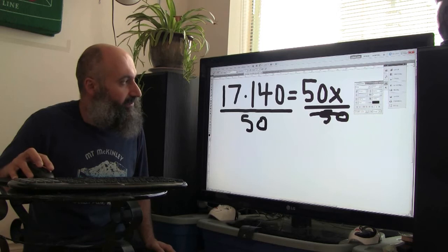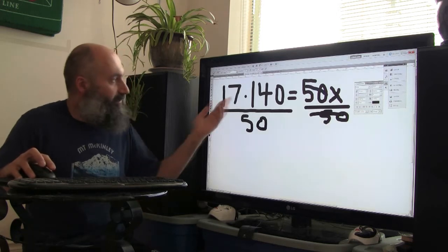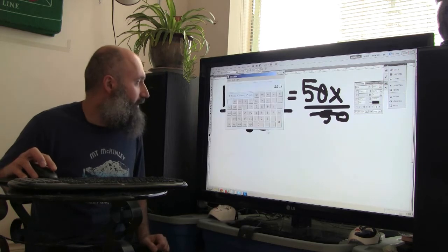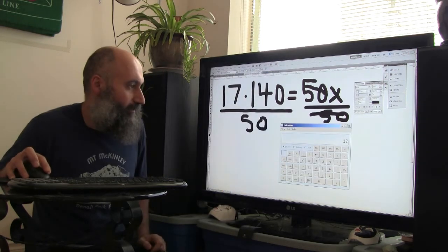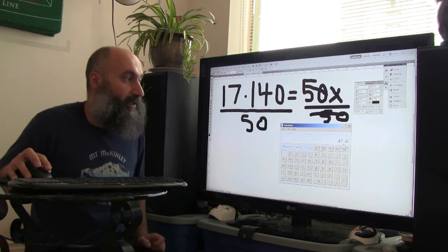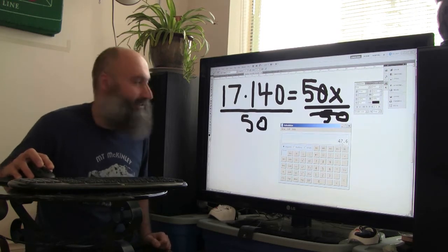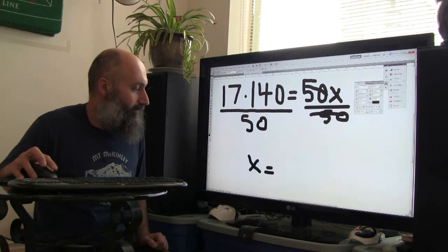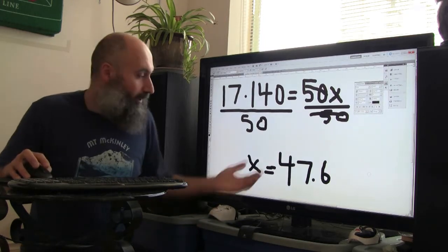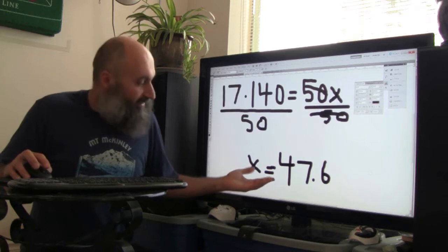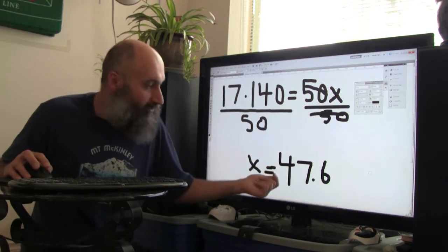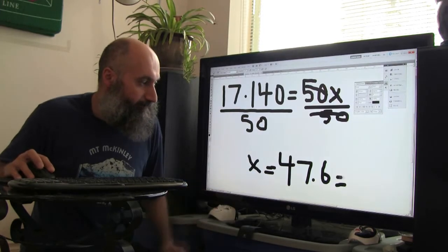So this guy kills that guy, boop. And now we just pull up a little calculator and do our calculation. It's going to be 17 times 140 divided by 50, which is 47.6, okay? So x is 47.6. So 140 videos is going to take me 47.6 days. Now, do we need the 0.6? Not really, so we're going to round this up to 48.